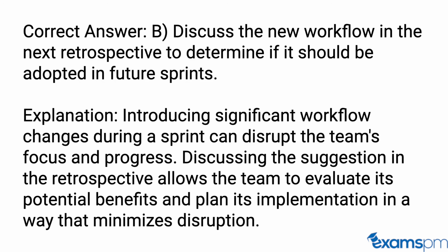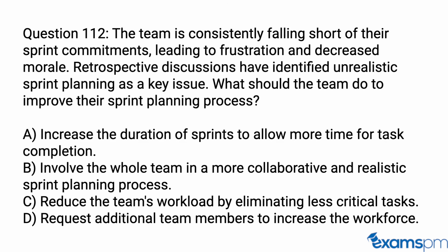Correct answer: B. Discuss the new workflow in the next retrospective to determine if it should be adopted in future sprints. Explanation: Introducing significant workflow changes during a sprint can disrupt the team's focus and progress. Discussing the suggestion in the retrospective allows the team to evaluate its potential benefits and plan its implementation in a way that minimizes disruption.